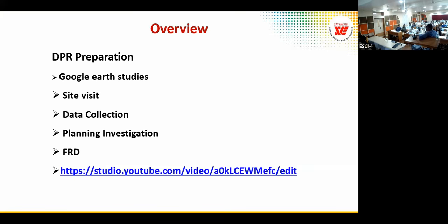So like that, data collection about access, about rivers. We had certain rivers where there are no bridges, so we had to take the material by boat, transporting the vehicle by punt to cross the river. All these were factored into our costing as well as our timeline.